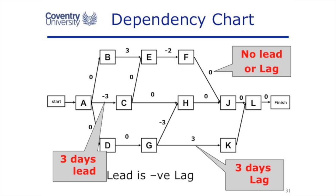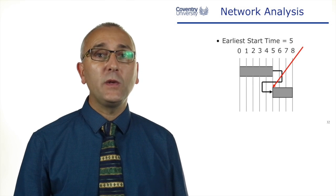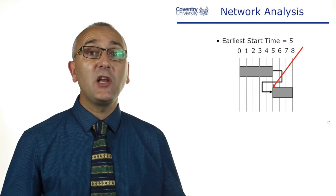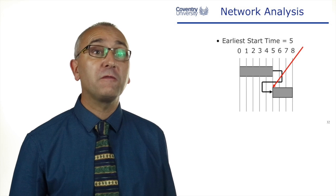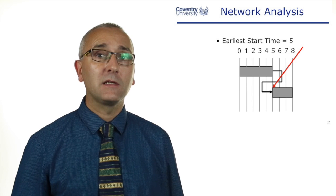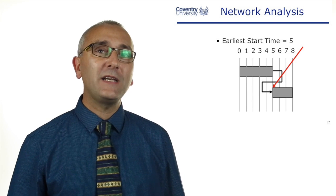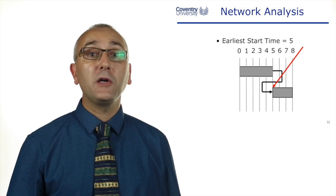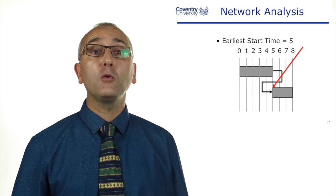What we're going to do is we're going to work our way through the project using some common sense to try and calculate when the project can finish. In this instance, the earliest we can start that second task is the length of time of the first task. If the first task took six days, I can't start the second task until day six. The start of any task is determined by the duration of the task before it.